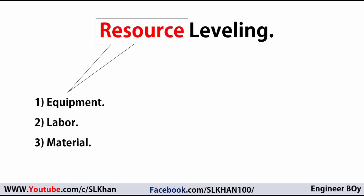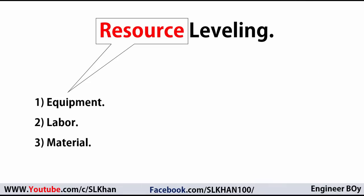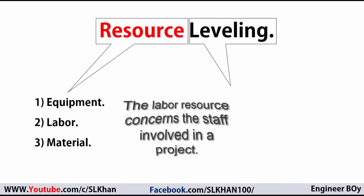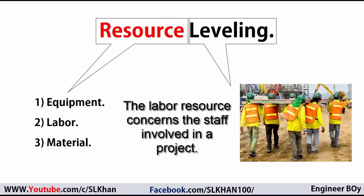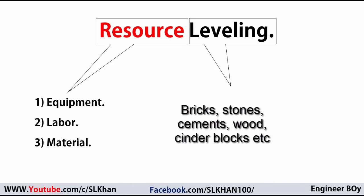Equipment resources are not permanently installed on site — these are temporary resources. For example, an excavator digs soil and is then taken away from the site, so an excavator is an example of equipment. Labor resources are the main manpower, with fixed salaries. Material resources, however, are permanently installed on site — for example, brickwork or stonework used to construct a building are permanent resources installed on the site.